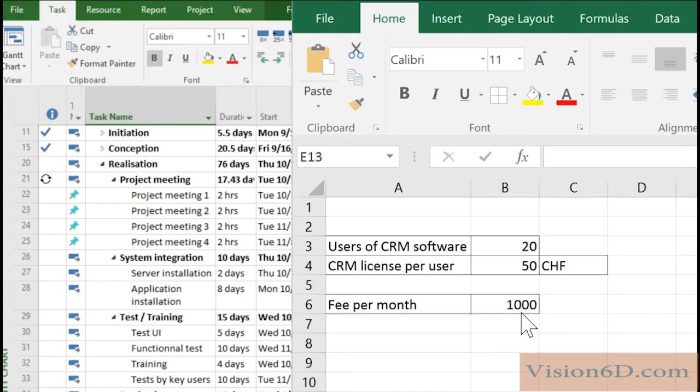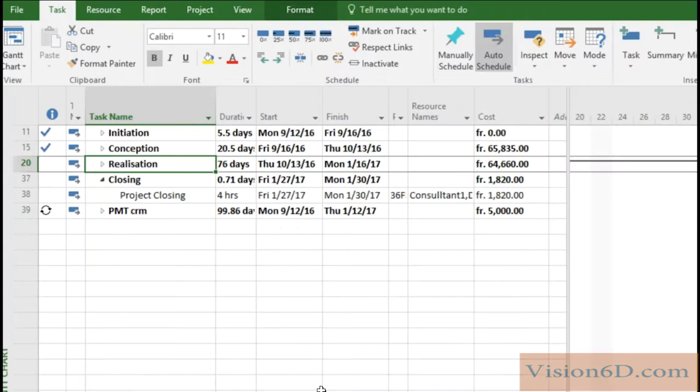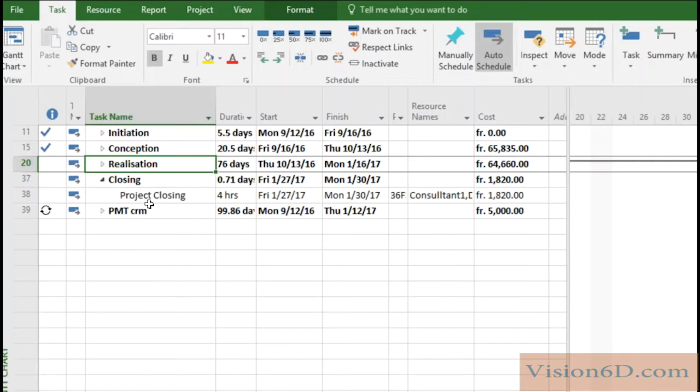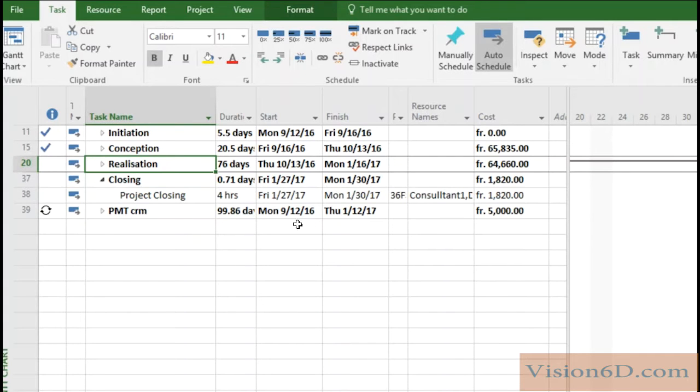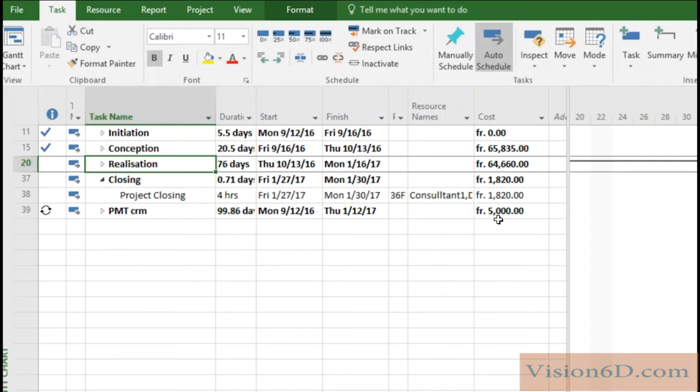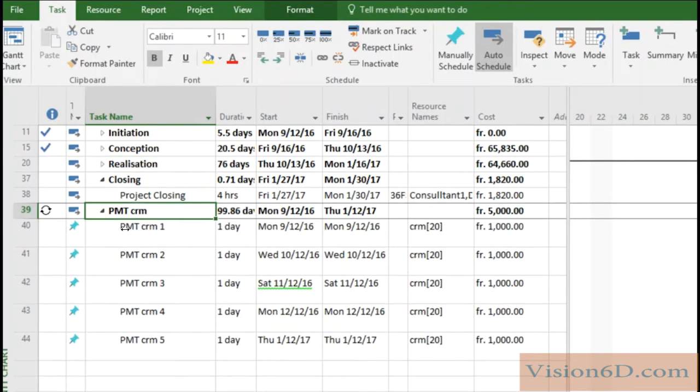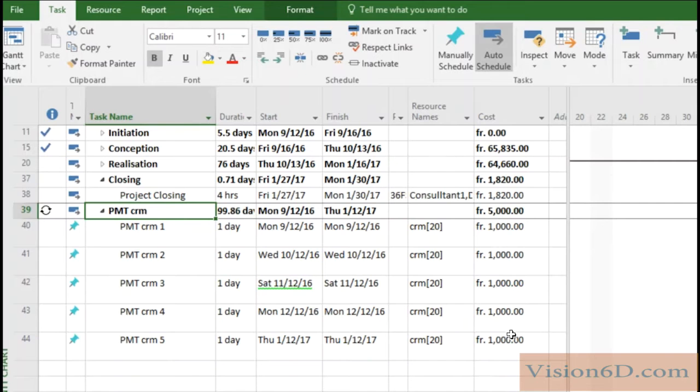So now how are we going to add this to the project? I want first to show you how it is done, how the solution looks like. So you see here I have below the four stages of my project added payment of the CRM and you see that the total for the period of the project will be 5000. If we admit that it was 1000 a month you are not surprised to see that there will be in all five payments. So as you see we have here each payment of 1000.